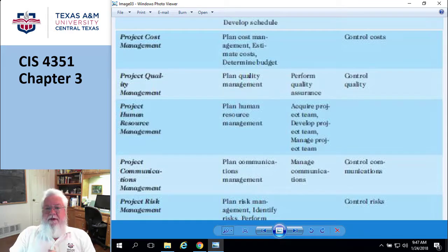And the idea is that if you're doing projects over and over, then you can slowly get better at, our cost estimates were pretty off. What went wrong? And so you kind of tweak it and tweak it so your time estimates get better, your cost estimates get better. It does take an awful lot of repetition to get this to work. So if you're only doing like one or two projects or you don't do them very frequently, then perhaps Six Sigma isn't the tool for you.